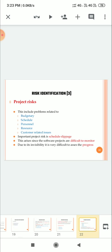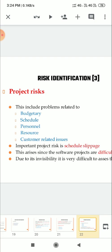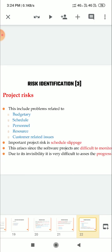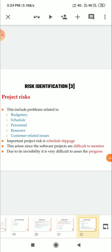So what is project risk? It includes problems related to budget, schedule, person, resource, customer-related issues. Important project risk is schedule slippage. This arises since software projects are difficult to monitor due to its invisibility. It is very difficult to assess the progress.